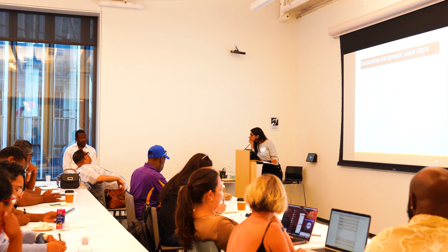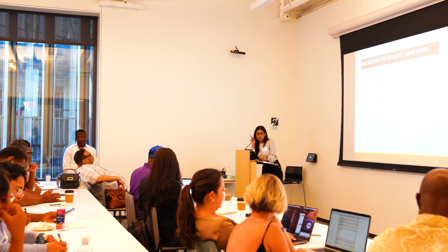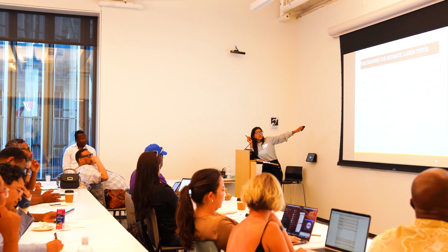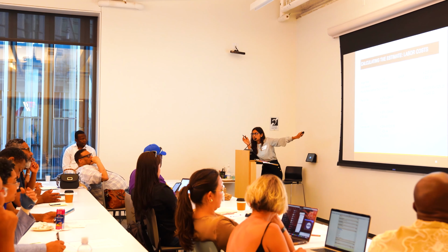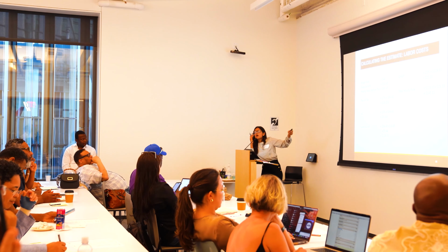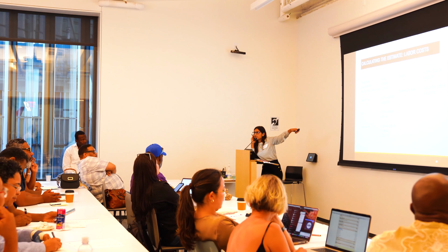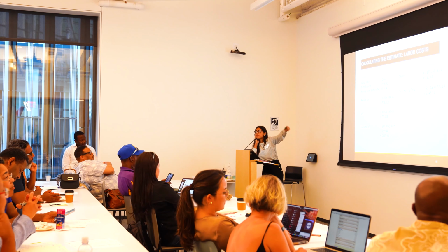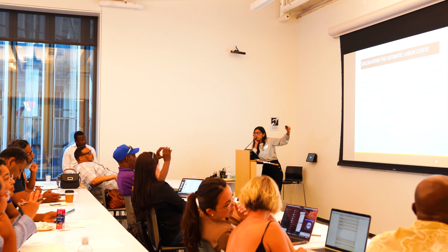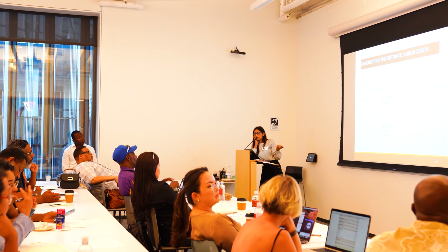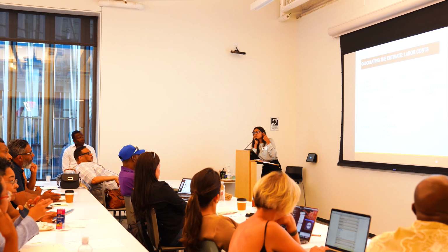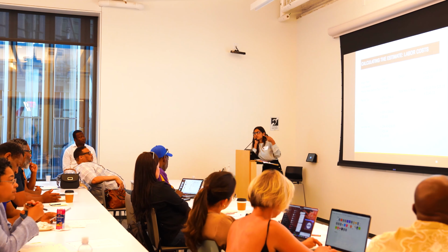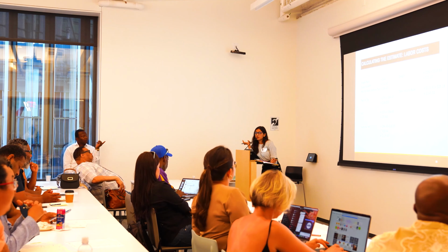What about your profit and your overhead? Yes, that's also something you want to include. Here's just an example. Again, don't use these multipliers as is. For payroll tax, you multiply a percentage, then you have workers' comp, you multiply a percentage, add that up, and that comes to your subtotal. Then I multiply an overhead and profit to that, and that's my total hourly rate. Sometimes we do carry overhead and profit below the line, but it's always helpful to put it within my labor so that I know it's covered.